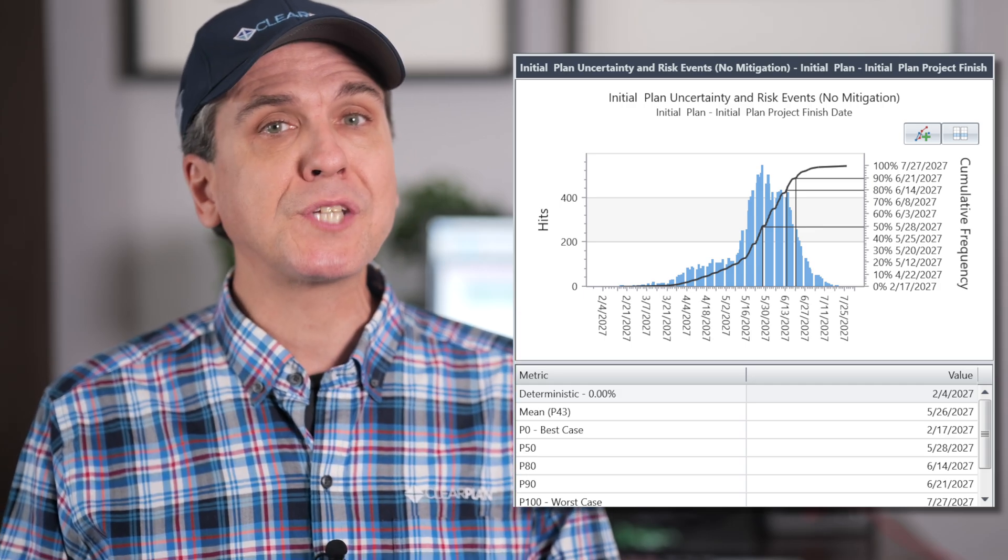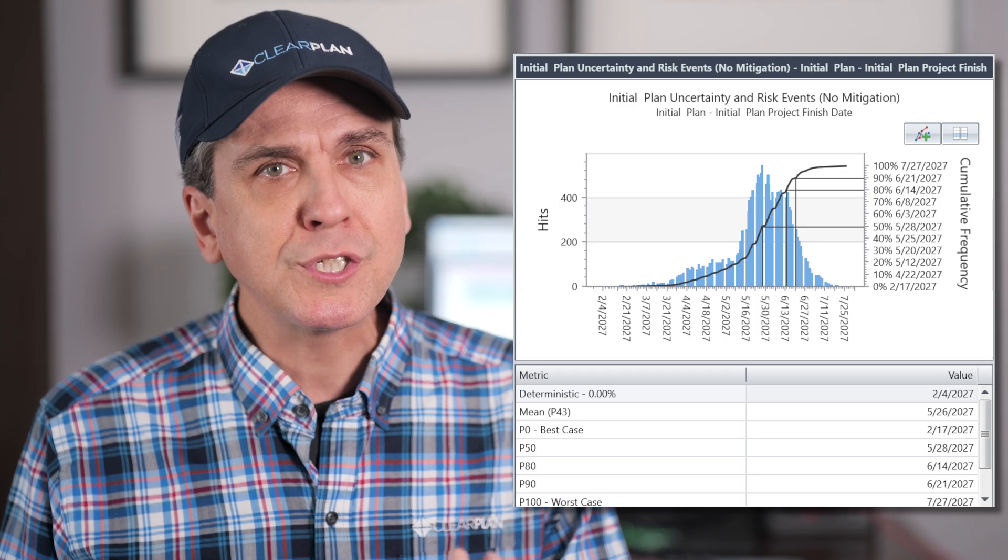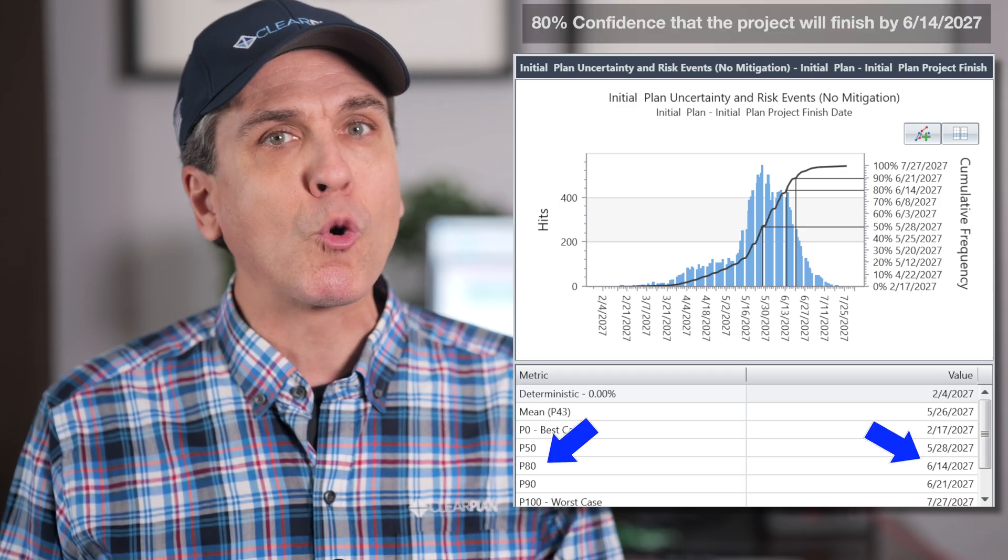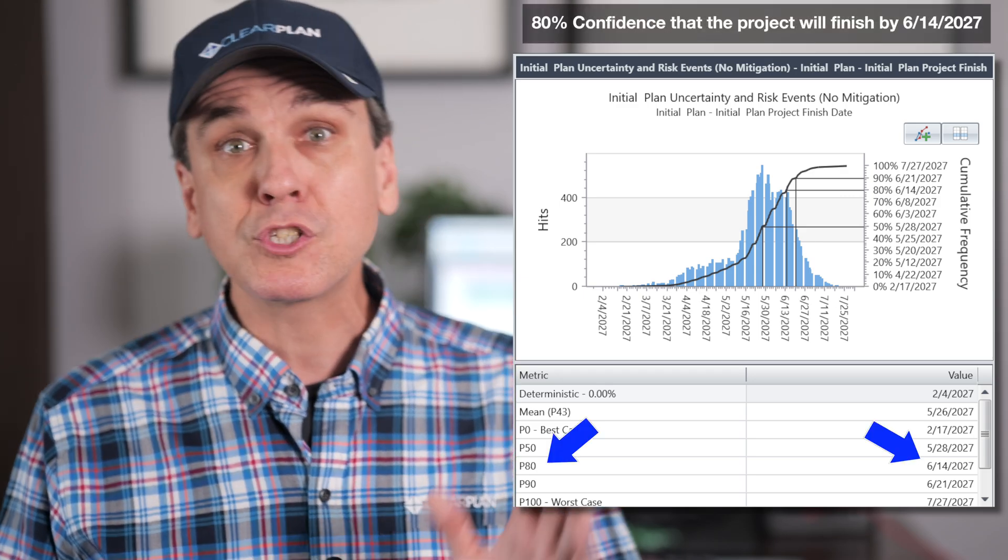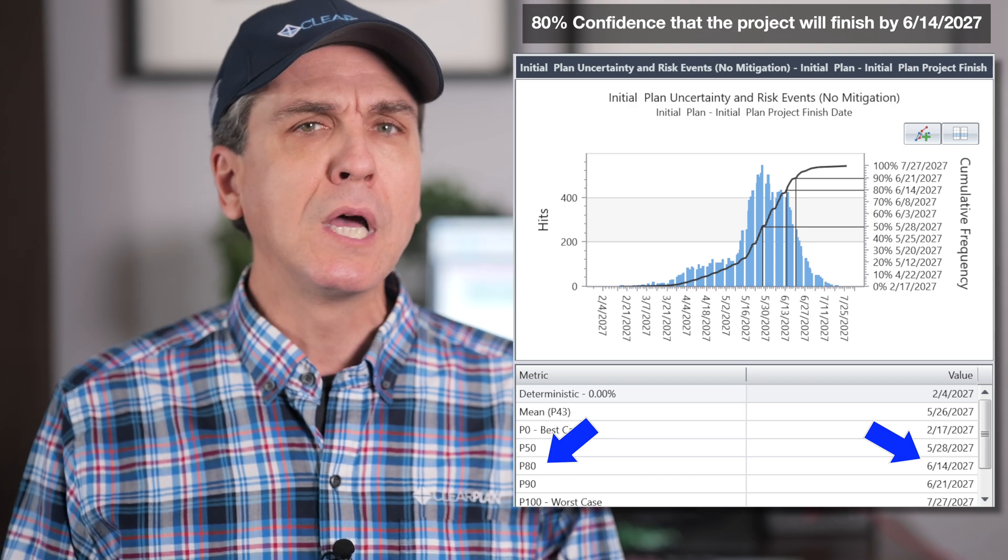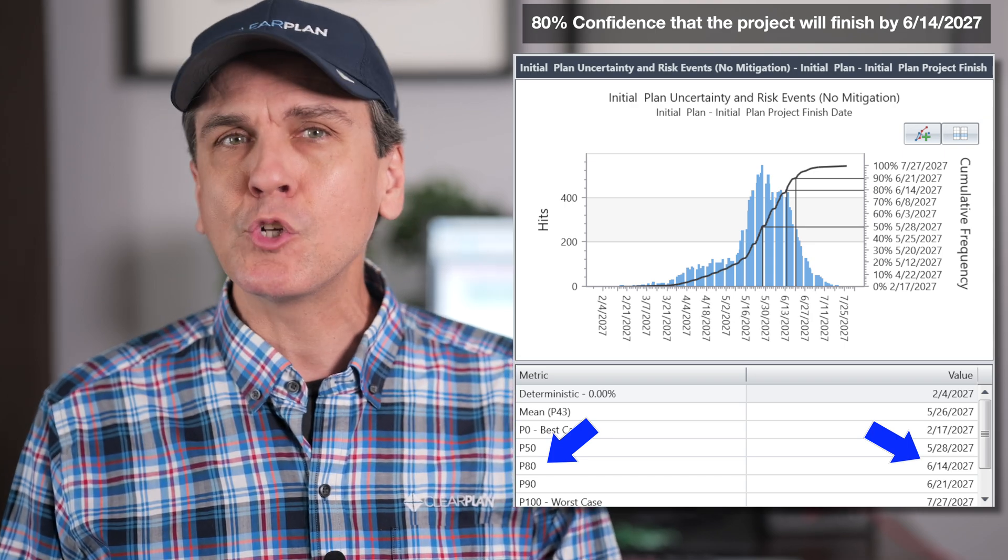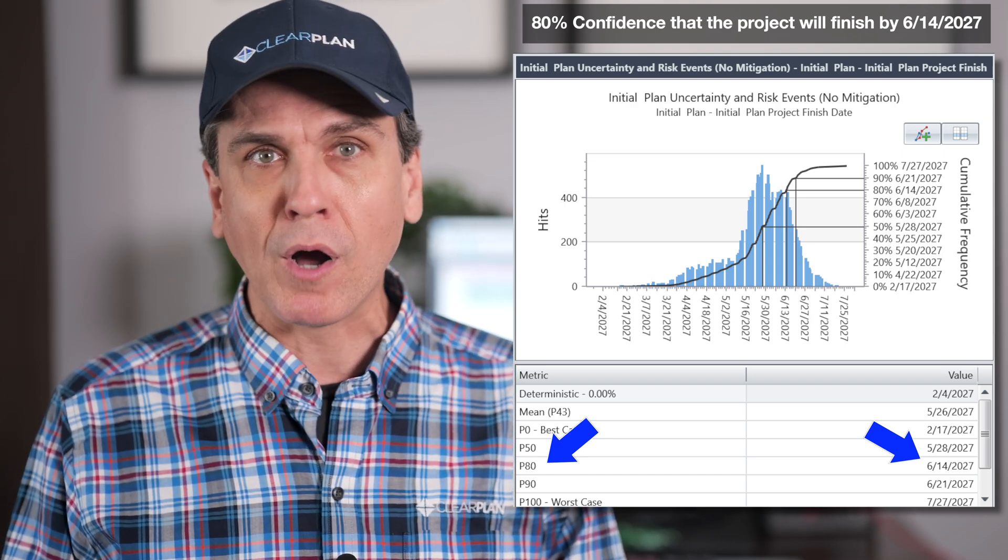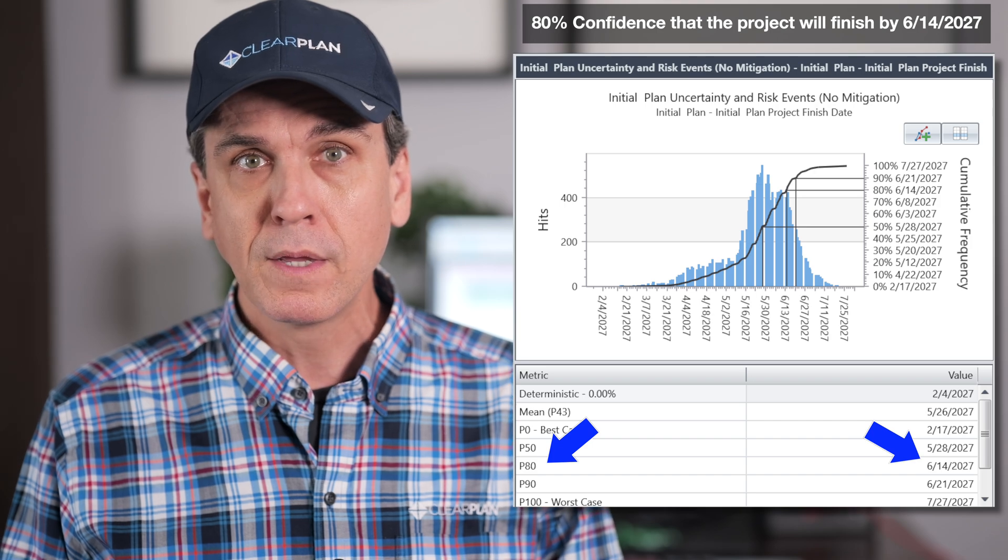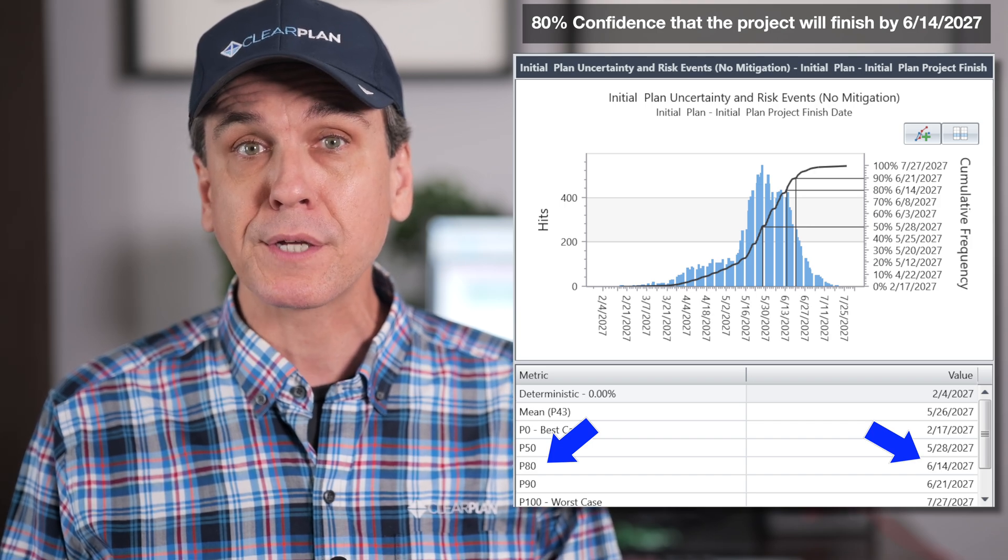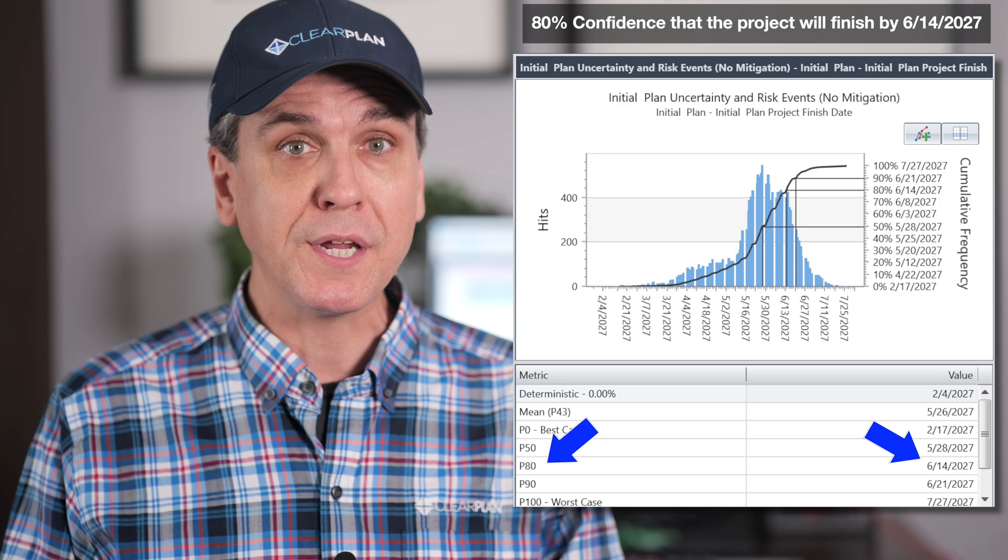It represents a unique set of circumstances where nearly all project risks occur and uncertainty is at its worst. Many projects instead focus closely and study the P80 or P90 date. These are still conservative dates to assess, but they don't assume that nearly everything goes wrong during execution. In the case of this sample project, the P80 date is noted here.